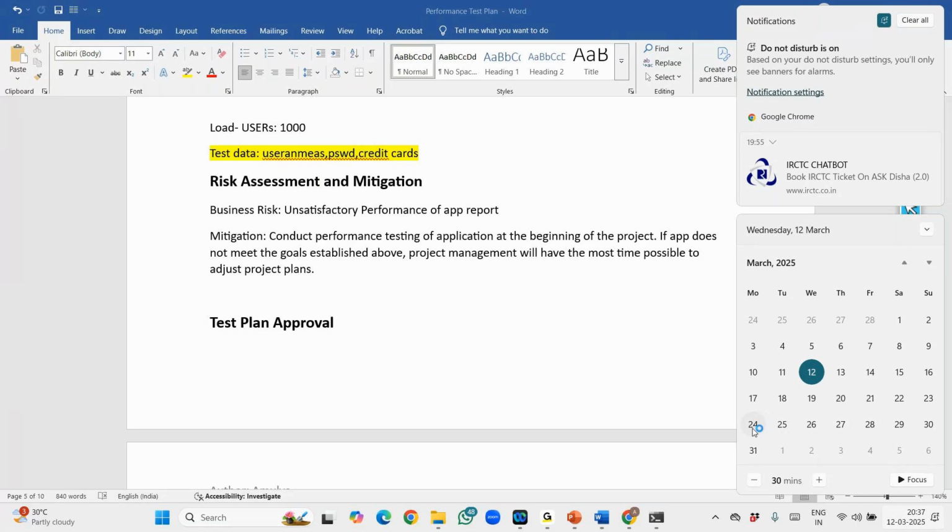Okay, if you simply start things on the 17th and plan to close on the 21st, then if you face any issues in the middle, that is definitely going to postpone your release date, which is going to impact production from the 24th. So whenever something like Instamart or Genie or whatever it might be, new functionalities are added into your application, you should start the work from the beginning.